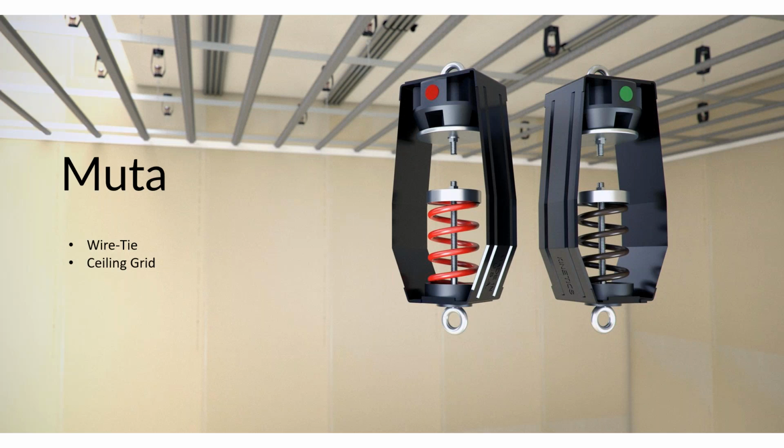And it's a little bit more difficult to change things in the field, because if they get that wrong, you're going to get pressure against that side grid. So yes, the contractors do prefer it because it goes up a little quicker, but there are some things that you need to keep your eye on when you're on the job site.